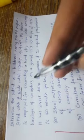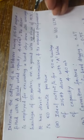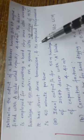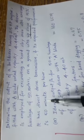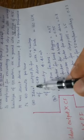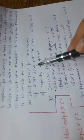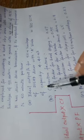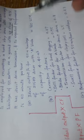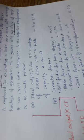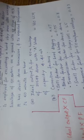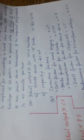An average haulage of 50 meters on ground with an upslope of 15 percent. It has direct drive transmission and is expected to perform 50 minutes per hour. The ideal output per hour for 50-meter haulage of 215 HP with A blade capacity of 4.40 meter cube is given as 160 LCM. You can check in the table given for different